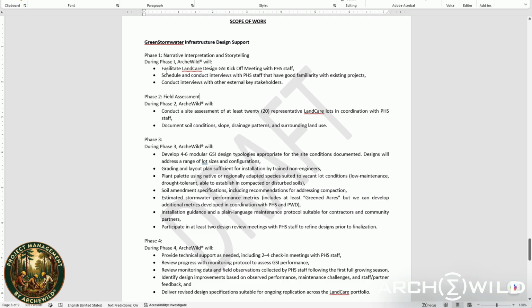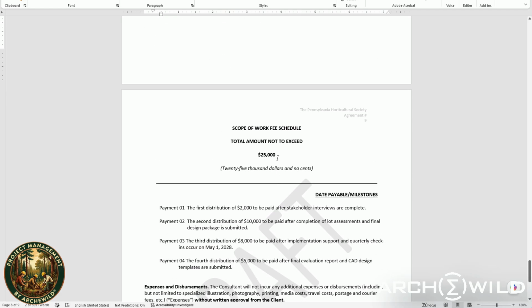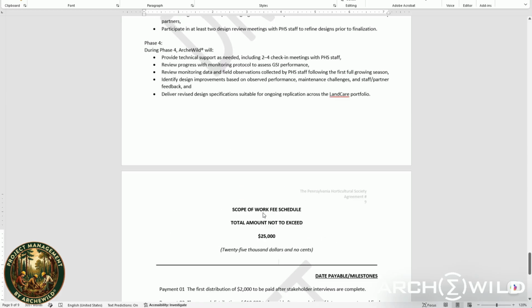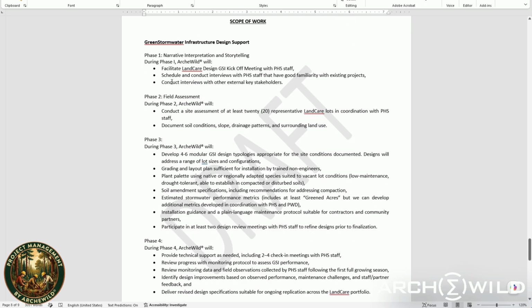So for the sales order that we have to set up in the PM app, one good way to start maybe is to just take each of these bullet points and convert them into sales order line items, if they make sense. They might or might not, but that's one good place to start. And we have a value for the contract. It's small, at $25,000. So that $25,000 ideally gets distributed across each one of these bullet point items if they are converted as sales order line items.